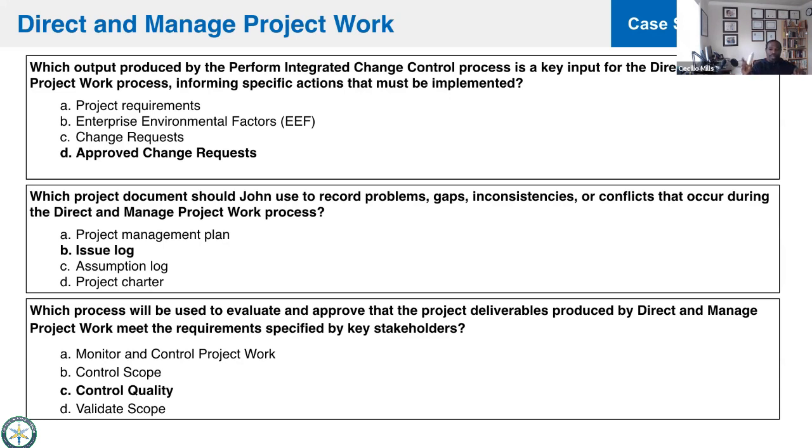If they ever talk about the deliverable, we're going to say the change log, and then it gets approved or denied. And if it's approved, then that approved change request becomes an input. That's an output from that process and becomes an input to this. But if we're just talking about the work and the people, then that's an issue. So this is between people.